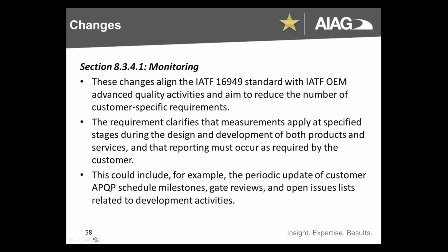So remember, a management review input is measurements at specified stages in your product or process design and development. Needs to be an input to management review. Reporting to the customer also has to include as required. And this can be accomplished in a variety of ways. Most common is the periodic update of APQP schedule milestones through a gated review process or open issues lists.